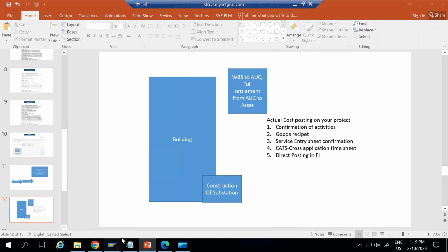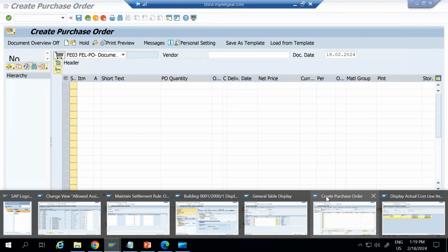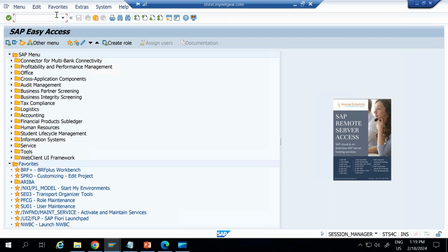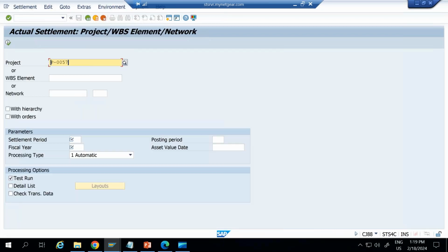Okay, so how can you do this settlement here? Let me show you here. This is an FI job. Okay, here go to transaction CJ88. This is my project, settlement period. So settlement period is basically 10th, because we have done the posting in October 2020. That was the only open period. Posting period also I'll take 10, and asset value date let it take automatically,